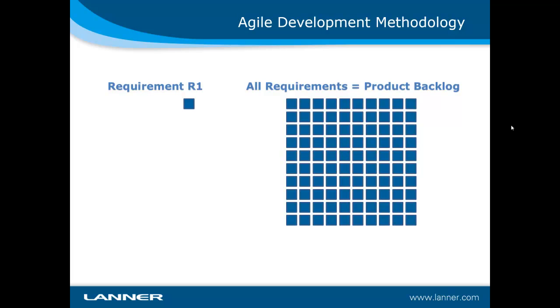The next step in the Agile development methodology is to identify a subset of those requirements which are the highest priority to you to complete first, and to do what is called a sprint, and they become the sprint backlog. Normally the aim is to get that sprint backlog to a point where the model is usable and complete in many ways, but can be added to by further sprints, which might add further items off the backlog. Often as well, the sprint is identified as a period of time rather than a number of backlog items which you wish to complete.